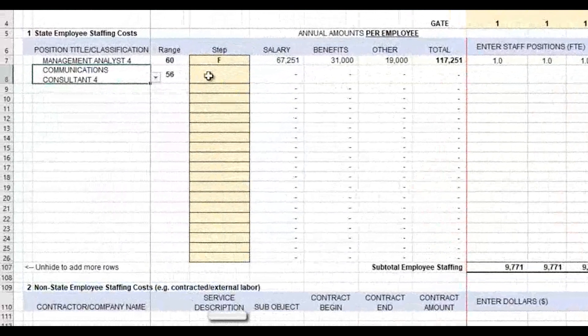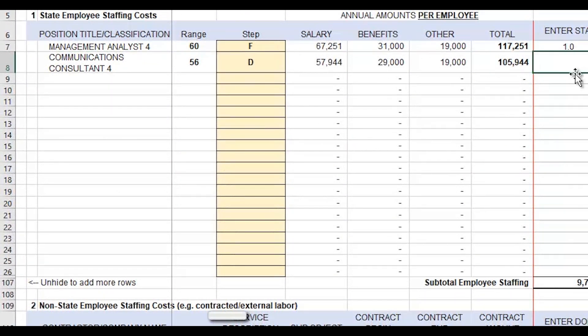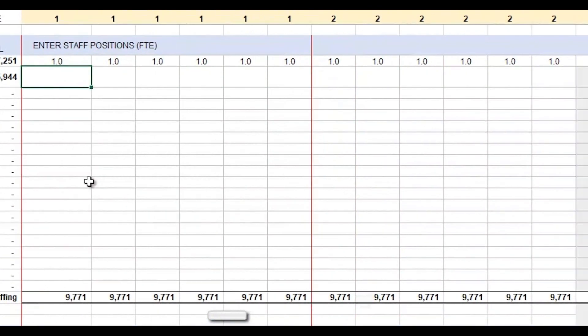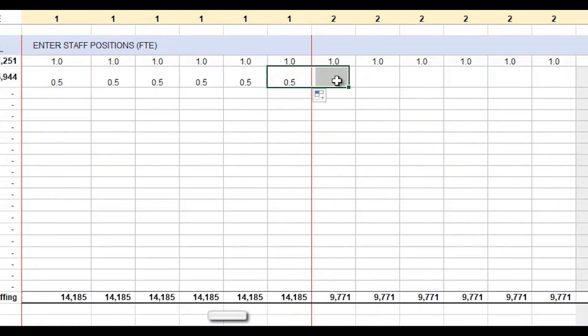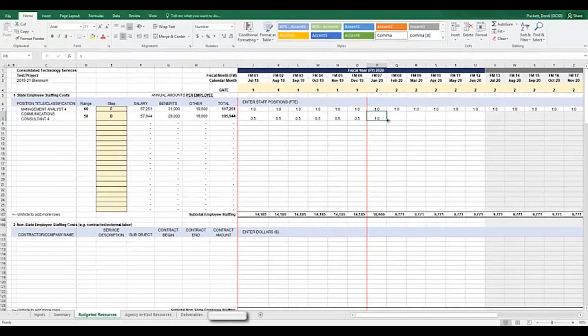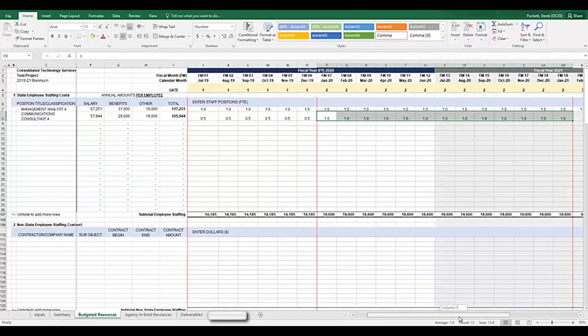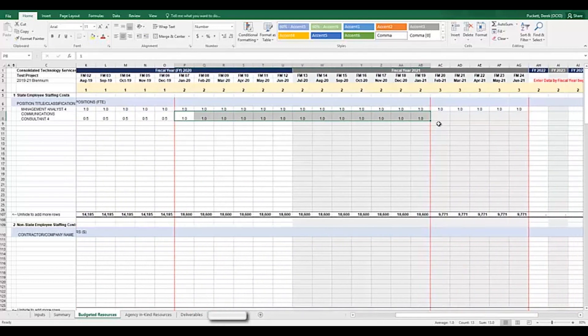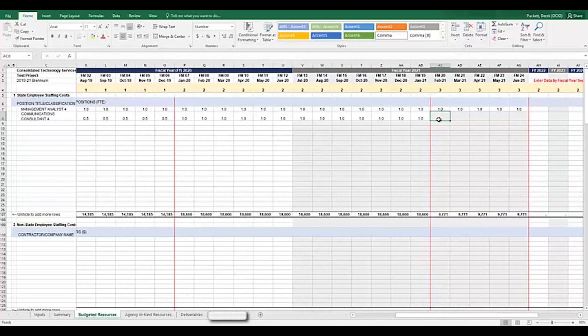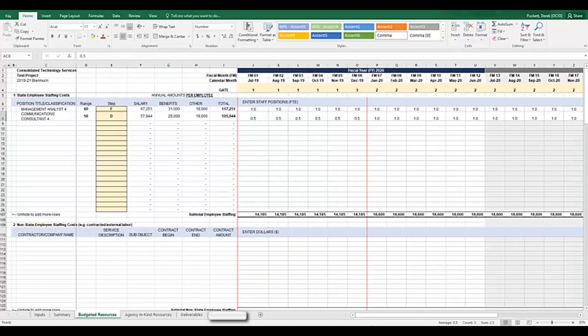I also know that I will need a communications consultant assigned to this project. I don't anticipate to use them full-time for the entire duration of the project, but I do anticipate to need them full-time in some months. In this case, I would put decimal values in the months that they won't spend full-time in the project, and a 1 for months where they will be full-time in the project. So for gate 1, I'm going to plan for this resource to be half-time. While in gate 2, I expect them to be full-time on the project. Notice that I input a 1 value for when I expect a full-time equivalent, and a half value for when I expect them to spend half-time on the project. I expect them to drop to half-time again in gate 3. And I'll populate the values for gate 3. Notice where I input the values for the resources across all of the gates.